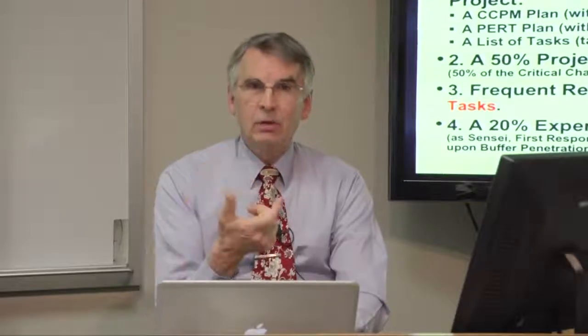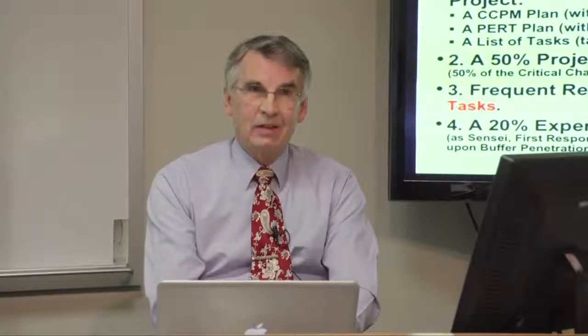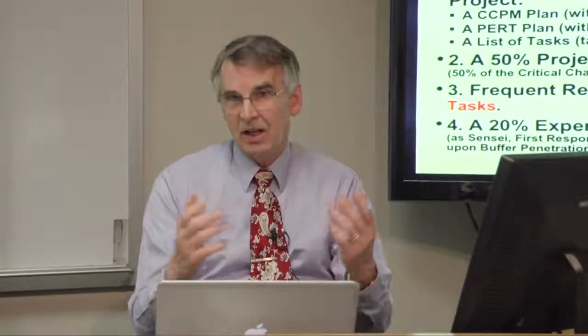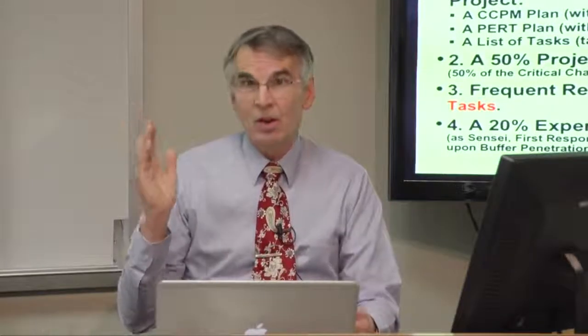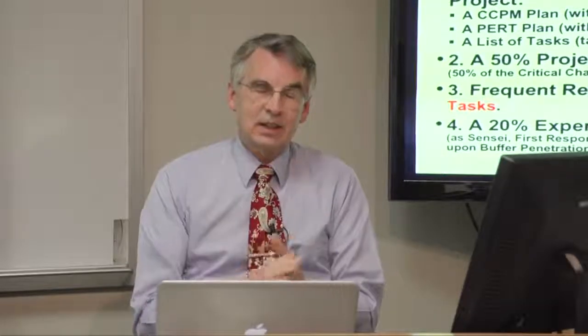And then you're going to frequently report when something gets completed. As soon as it's completed, you report it to the system so the system gets updated and we know the status of things. We're not guessing at something that's halfway done or 50% done or 90% done. We all know that when something's 90% done, what that means is you've spent 90% of the money you had to do that project, but it may take you quite a bit longer to get it done. So we're just going to report things which actually get completed.